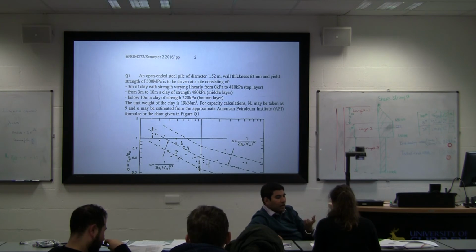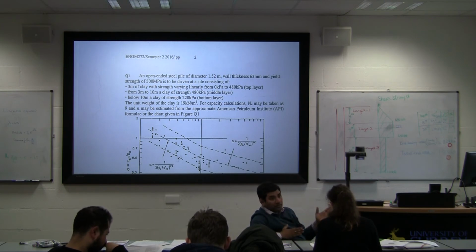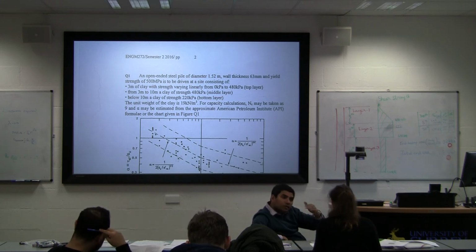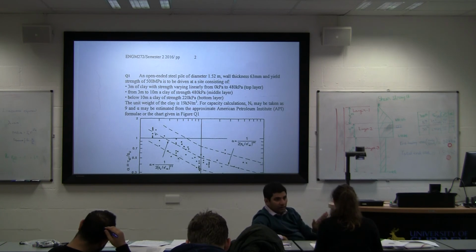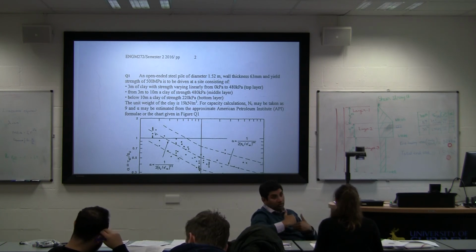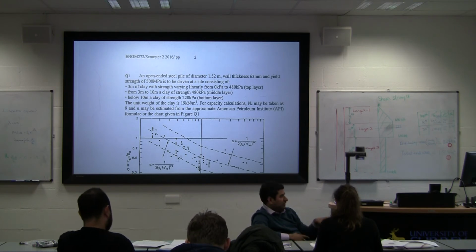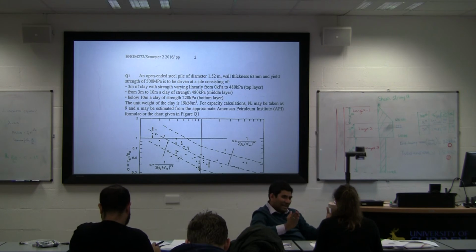And you say, but what you do, you issue a divorce case, then we do value engineering. And value engineering means I will see if I can cut down the cost. So I will investigate, I will put $10,000 to investigate, to see if I can get the cost down.